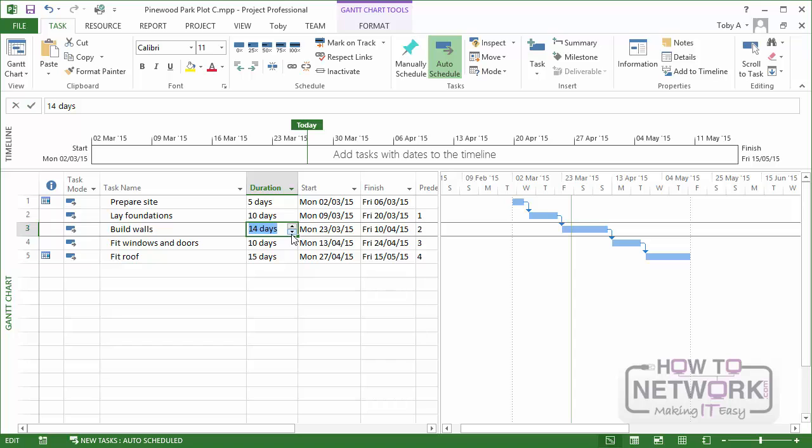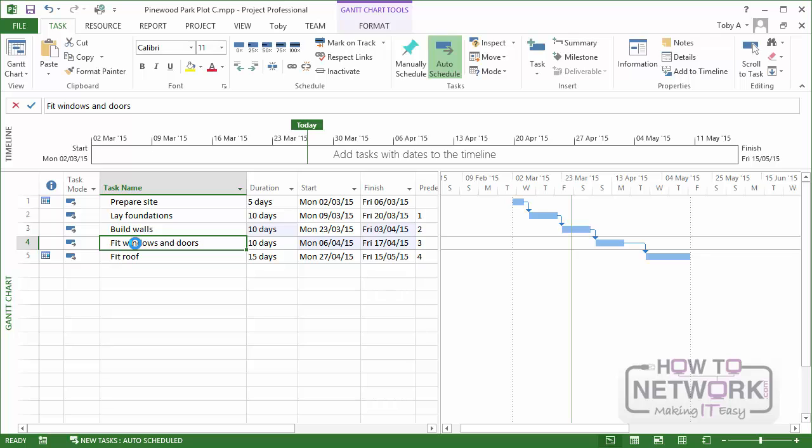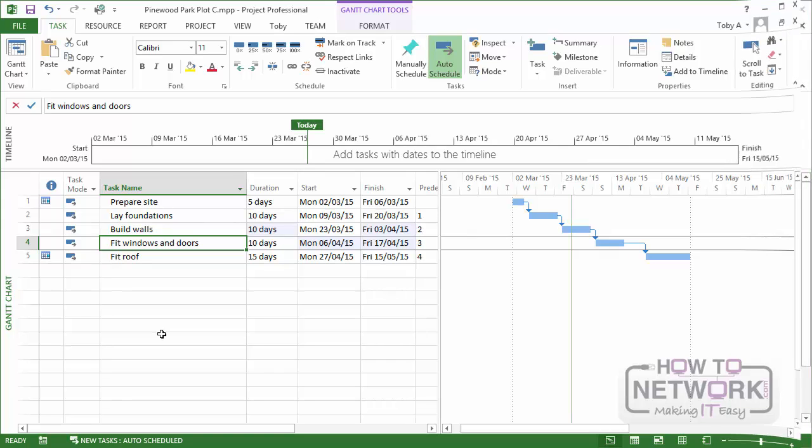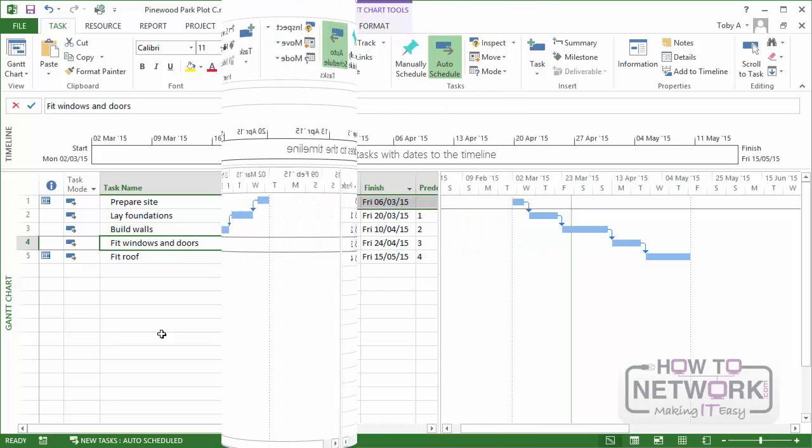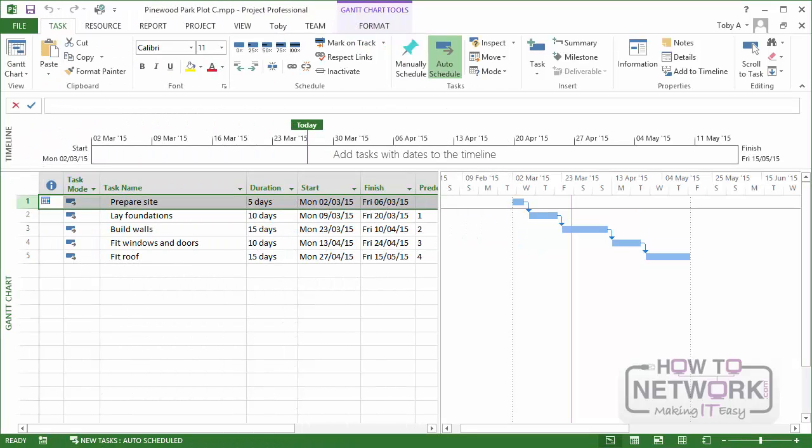Let me go back now and change build walls. Again, I'm putting it from 15 days down to 10. Now watch what happens. You can see that the FitWindows and Doors task is able to move. That starts a week earlier. But the FitRoof task cannot move.